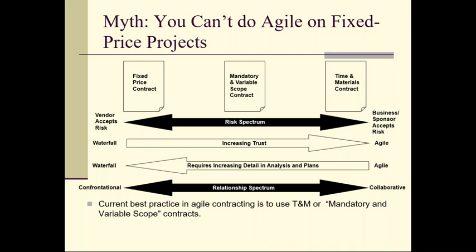So there's contingencies built into the points estimates as well to protect the vendor. And there may be hidden contingencies around schedule as well. For example, in this case, I've done this once on a project. I built 6 months times 50 points for the variable scope phase, so 300 points.